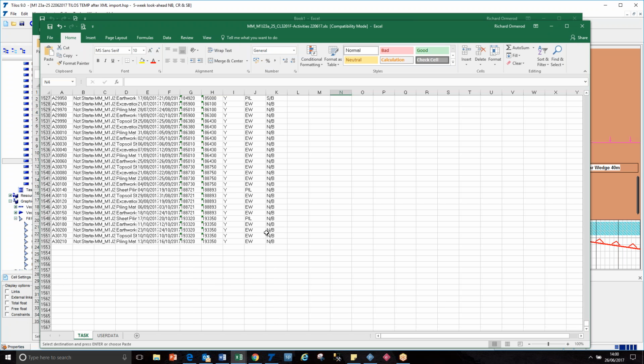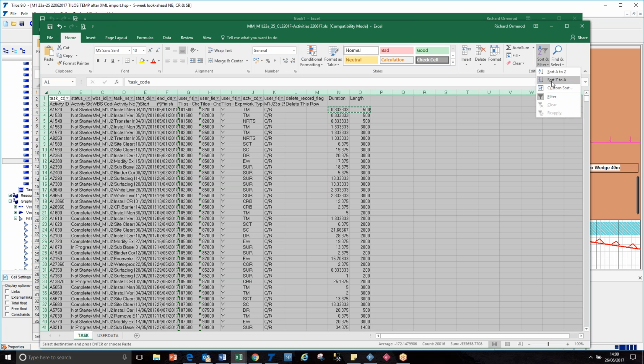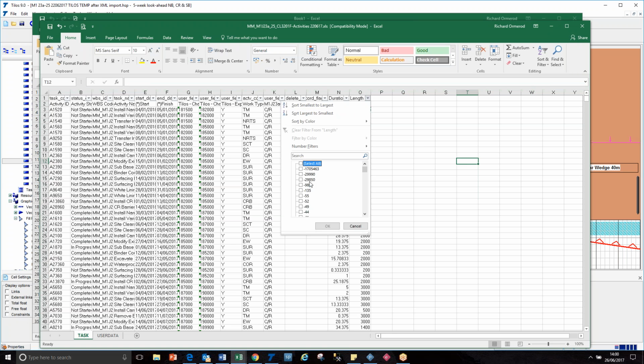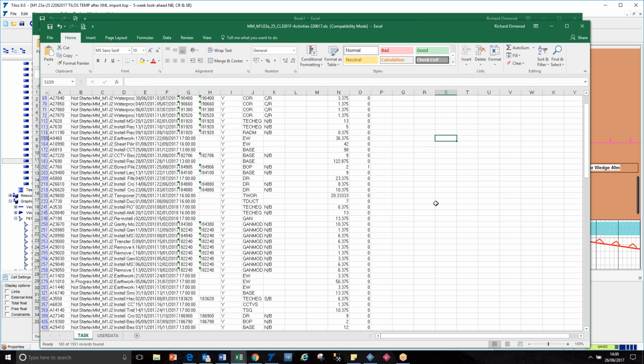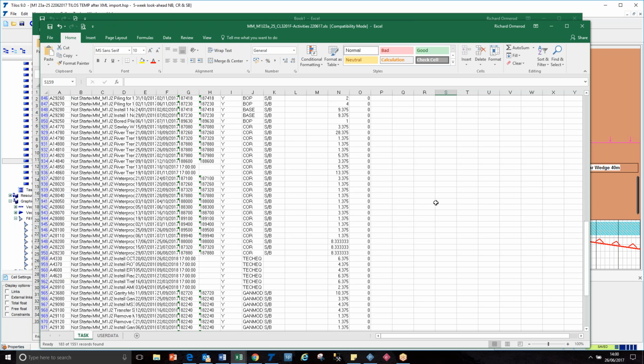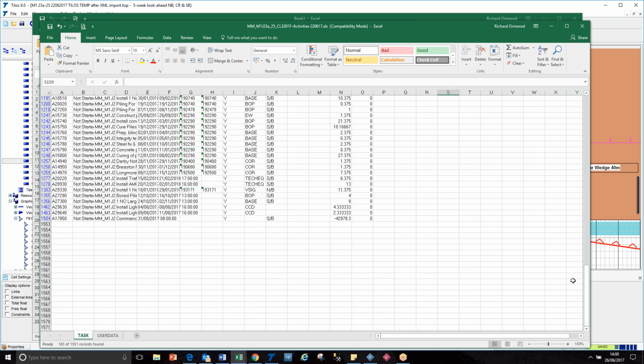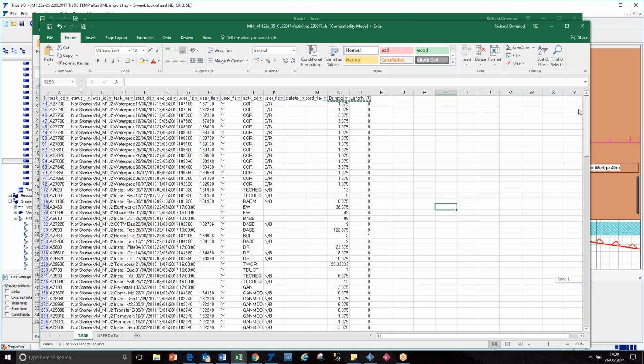We've just gone past a whole bunch of stuff that doesn't have a value, so we could unfilter that and refilter that. I want to find anything with 0 length, or even 1, frankly. What is 1 meter? You just won't see it. It's going to be very, very difficult. You might see a horizontal line, maybe. There's loads of them, isn't there? So they just really won't be obvious on the diagram.